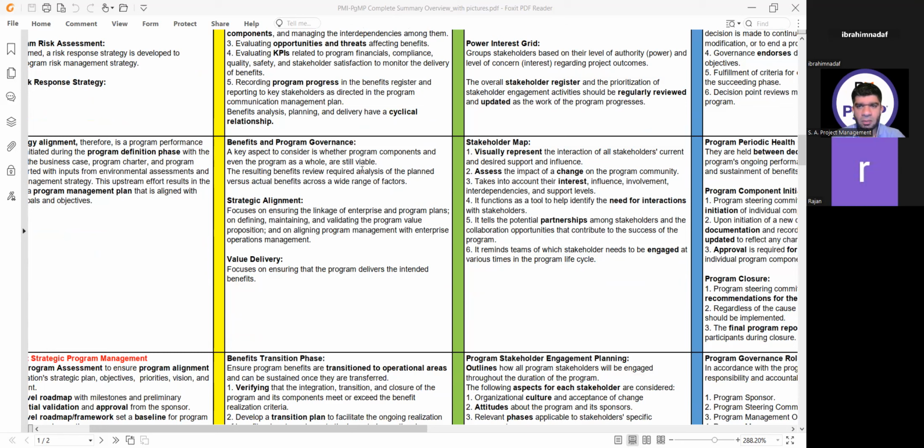Yeah, I'll just take 30 seconds. So when it comes to risk, project level risk, if it is a single component or a single project, where if any risk comes in, then that project manager is responsible to handle that risk. If it is interdependent, multiple projects or components, then the program manager has to incorporate that. Is my understanding correct? If that risk is only affecting that project, then it's at the project manager level. The second concept, if it is interdependent or it needs to be escalated, that cannot be handled by the project manager and he needs to escalate it to the program level, then the program manager will be involved. So it will become a program level risk in two cases. Number one, as you said, it is interdependent, meaning other projects are also affected, or if it has to be escalated to the top level. Got it. Thanks. Yeah.